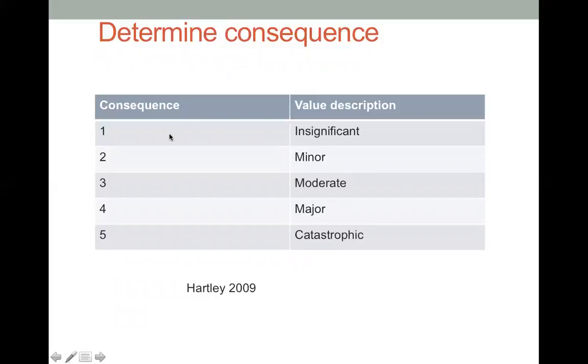Again, how do we measure it? We can also rate the consequence or impact from 1 to 5, 1 being insignificant, 5 being catastrophic. Catastrophic could be, in the context of WHS, someone may get injured and may need to go to the hospital for many days, or it can also involve a casualty.